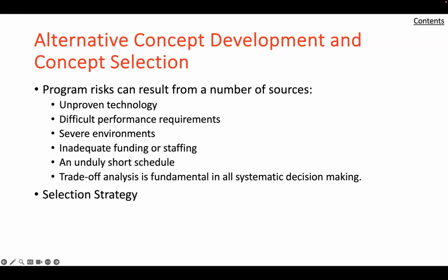Two additional guidelines for conducting complex trade-off analysis may be useful. One, to conserve analytical effort, use a staged approach in the selection process in which only the most likely winners are subject to the full set of system evaluation. And two, retain the visibility of the complete evaluation profile of each concept against each critical measure of effectiveness until the final selection, rather than combining the components into a single figure of merit, a practice that is often employed but that tends to submerge significant differences.